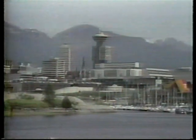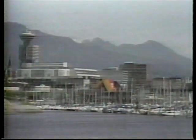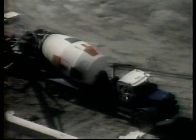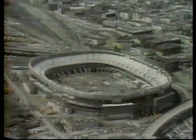Construction actually began in April of 1981 using a method of construction called fast tracking. The architects were drawing blueprints while the building was actually still being built. The architects usually staying 2 to 3 months ahead of Dillingham construction, but there were times when it dropped to 2 or 3 days. A tremendous project and quite an accomplishment to finish. 4,409 tons of steel, 69,371 cubic yards of concrete. That is enough to build a sidewalk from Vancouver to Tacoma, Washington. Those figures represent roughly twice those of a modern high-rise office building.